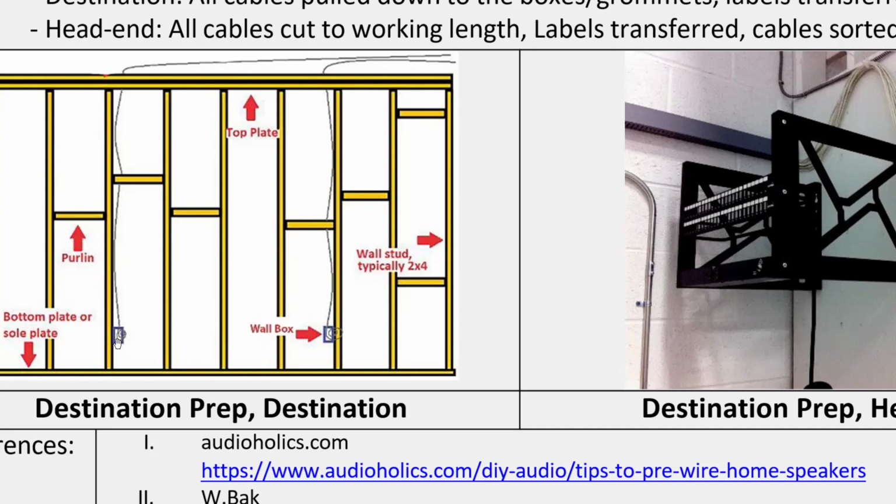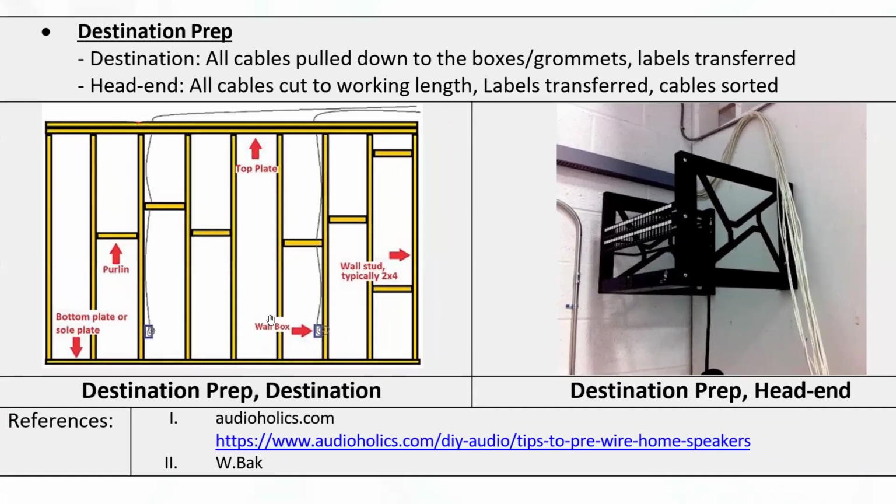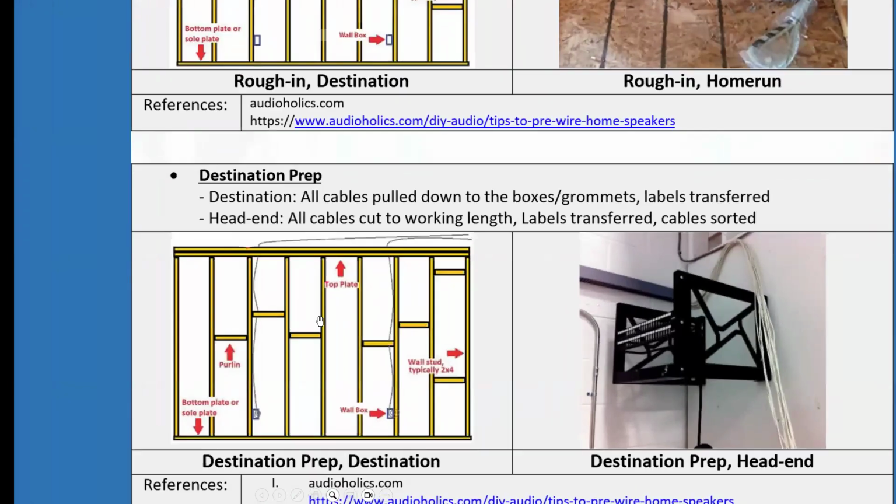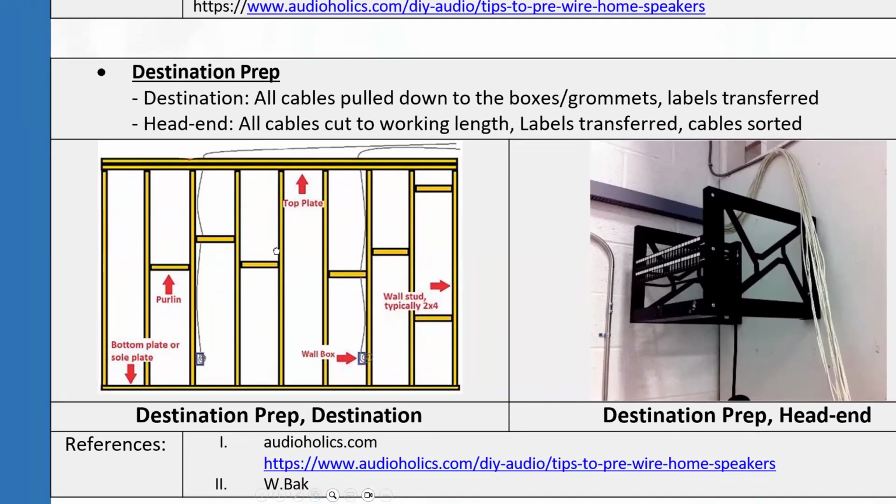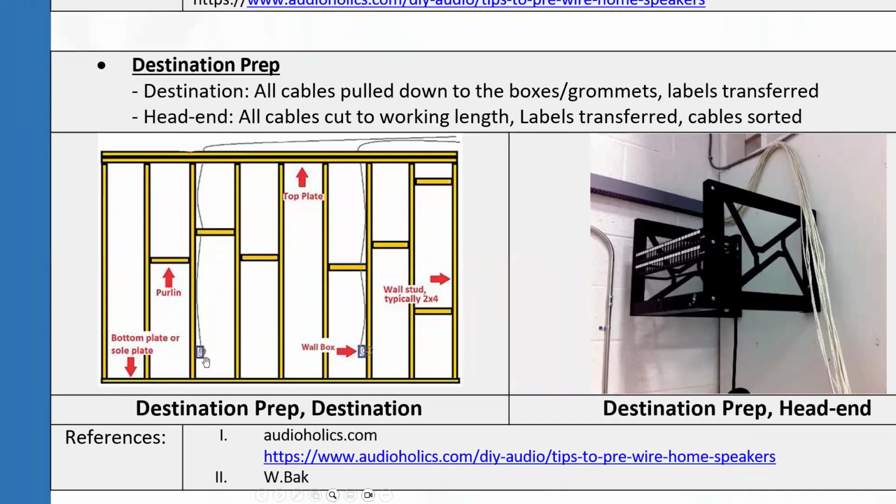Right? So they might just not be as careful as the wires should be treated. So some things can be destroyed, wires can be damaged. Or painters will just paint around it, and that's also not going to look very attractive as the new type of construction that's just completed. So, depending on what the situation calls for, you might install the faceplates by then, or you might have to wait.